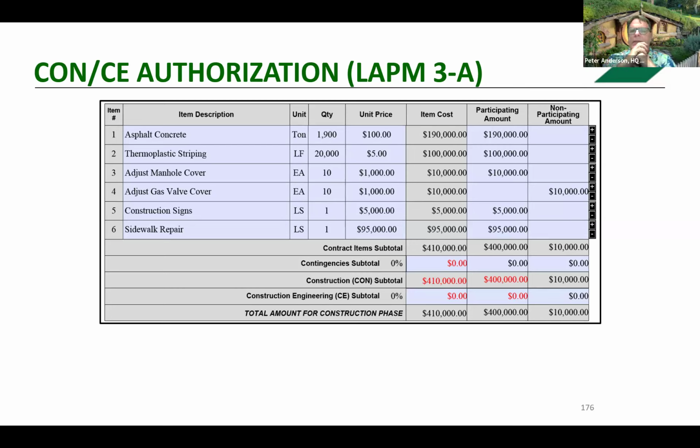The other one that's a little tough is when you're dealing with state funds, the time use of funds requirements for ATP, STIP, and that. They do have time use of funds requirements to award a project within 6 months, etc. Those are hard, fast deadlines associated with the federal or state programs office. There are time use of funds extensions that can be granted, but just be aware these things can come into play with projects allocated through the CTC.